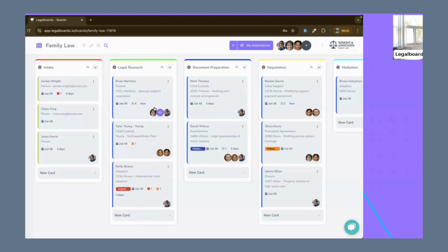That's the real goal of implementing Kanban and agile methodologies into firms, is to help you visualize what is really important. Another visual cue that is really important for us is, well, the red, right? We have an urgent label here and overdue tasks here. Well, this is not good. So this helps you to look for those insights. We have a lot of automations related to that. So when a file is stuck here for over 4 days, we have automations running here and helping you with that. So it's not only using the system, but also having the system give answers to you just to look at them.